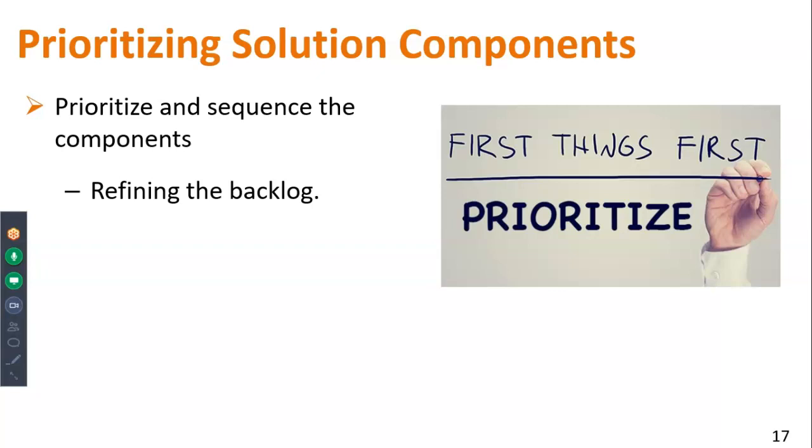Something that you may not perceive as adding tangible value to the initiative or to the project may be something that is foundational, that the entire project can't move forward without, so that no value can be created before this particular aspect is taken care of, even though this aspect in and of itself will not necessarily deliver any value.